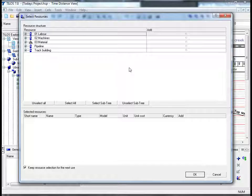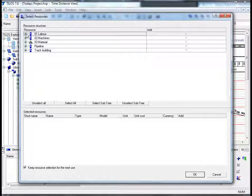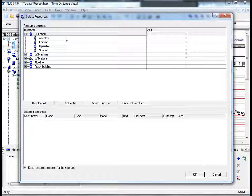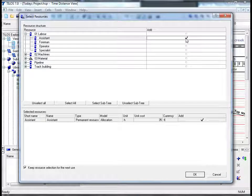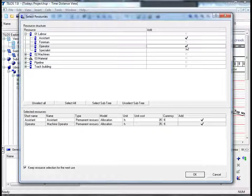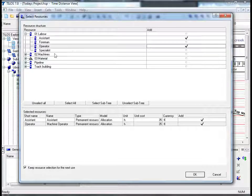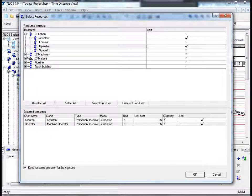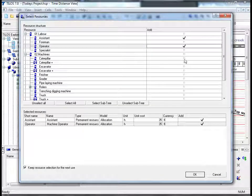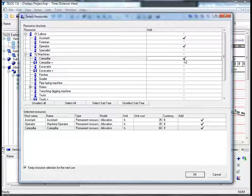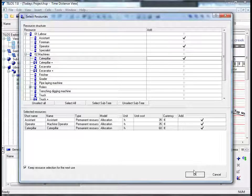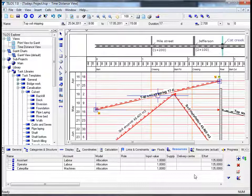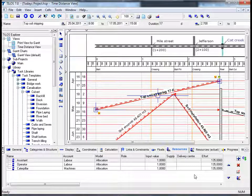In this specific example, let's click on the plus sign next to the labor section. For example, let us choose the assistant by ticking in the box and an operator. We will then choose from the machines section by clicking again on the plus symbol, and we will choose a caterpillar. After we have done so, we will then proceed to the bottom of the screen and by clicking on OK, we will have successfully assigned these resources to the task in hand.